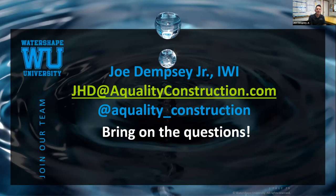There are some things like all tile, we'll put a budget in instead if there's a subcontractor. If it's something that's totally new, that's not just a swimming pool box that someone else is installing a movable floor system inside of, then, just because of my conversations with you, Rick, we've started to do some more T&M for the unknown projects. Yeah, if you can break them down into small enough parts, you can usually get your hand around it, but sometimes they get big enough to where it's tough to get those parts broken down. But communication and everything else with the client and having your accounting very clean, right?